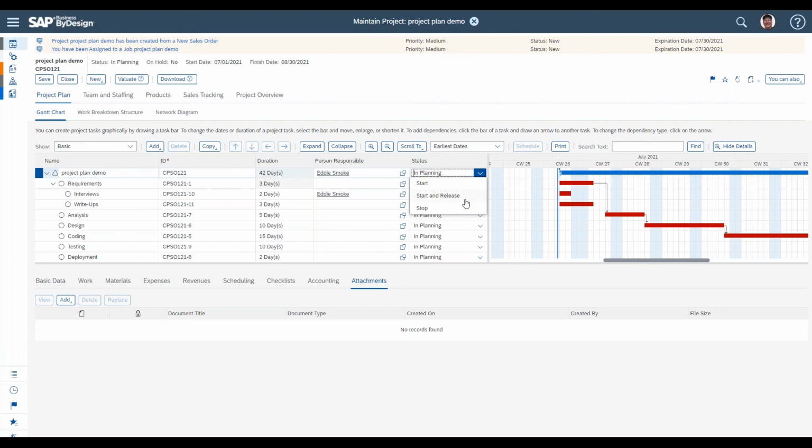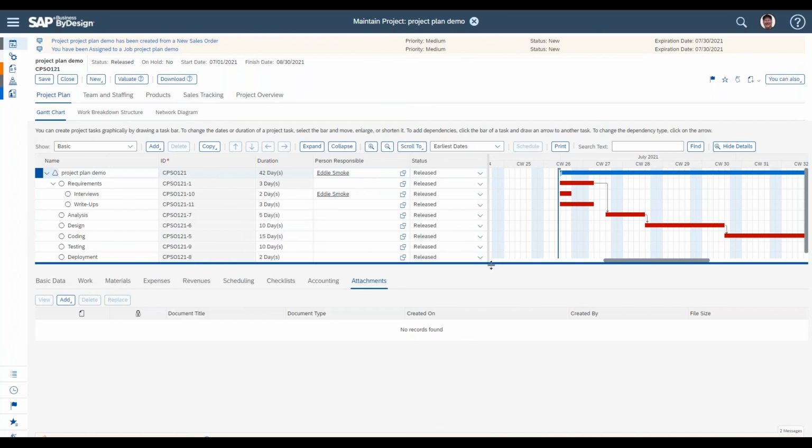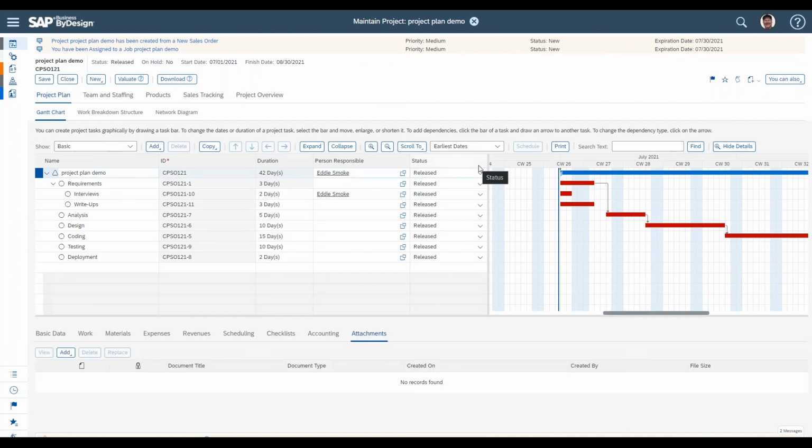So it lets the finance modules know about the project, locks in the project code, but the release functionality then opens it up and allows people to start seeing those tasks in their timesheet, recording time in their timesheet, as long as we've assigned them to those tasks. So I'm going to go ahead and do start and release, and you're going to notice something that happens here. The release is what SAP calls a propagating status change.